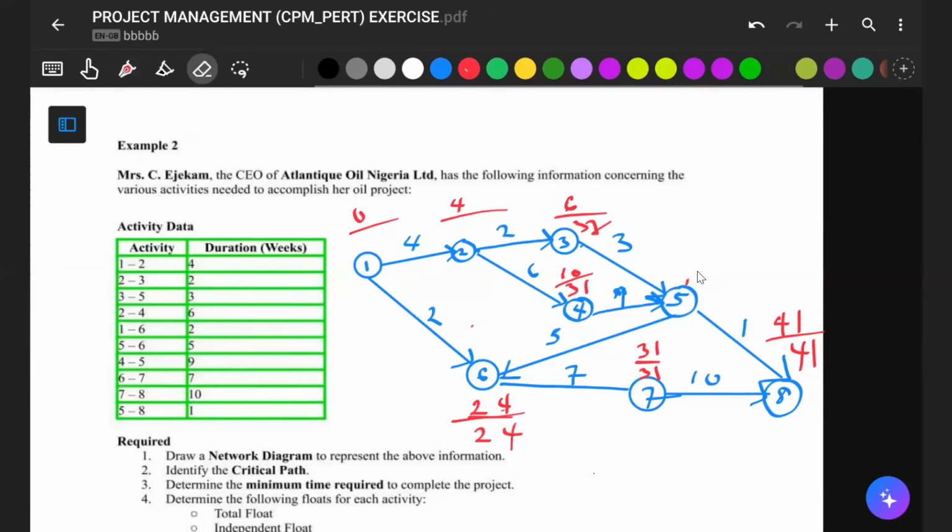So let's see. What do we have here now? We have 19 over 19 here. So that's taken care of around this point as well. Now going back, if this is 19, we are going to 3. So 19 minus 3 will give us what now? 16. Give us 16, sir. Beautiful. So let me clean this off.